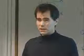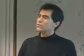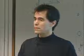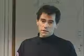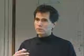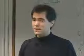What you really want is to get your operators in flight operating and testing early enough that they can go through all of the gyrations of the testing environment and all of the idiosyncrasies of the hardware before flight, so that they're trained on the hardware and they know how the hardware performs. And so if you can, you want to try and get the operators to do the testing prior to launch. And a lot of times that isn't the case, unfortunately.